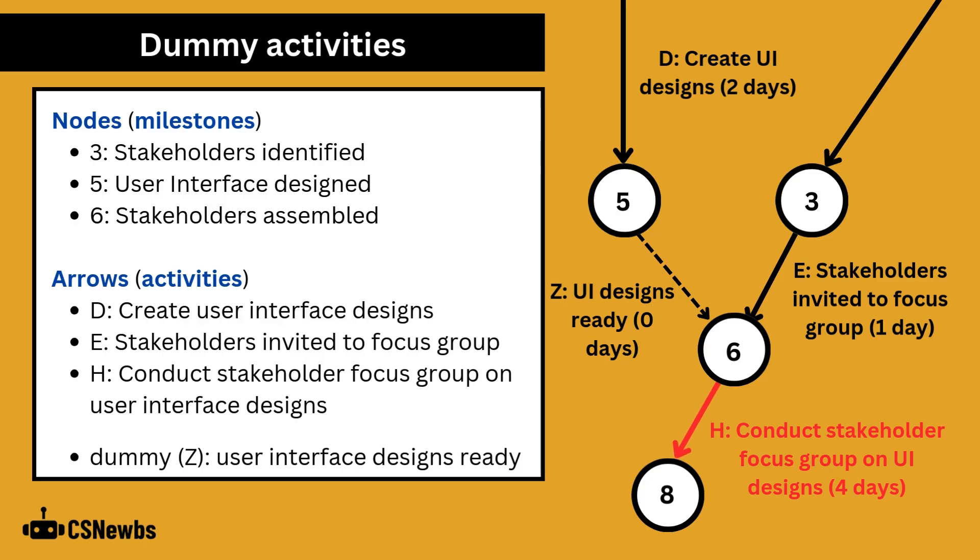Let's work backwards. Activity H is conducting a stakeholder focus group on the user interface designs but this can't be done until the stakeholders have been invited to the focus group which is activity E and is a direct dependency but we can't show the stakeholders the designs until they have been created which is activity D and takes us to milestone 5.